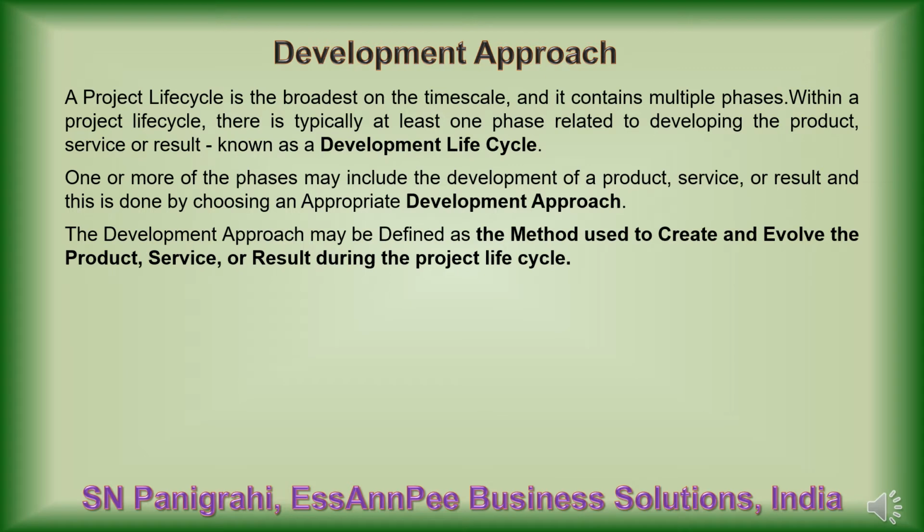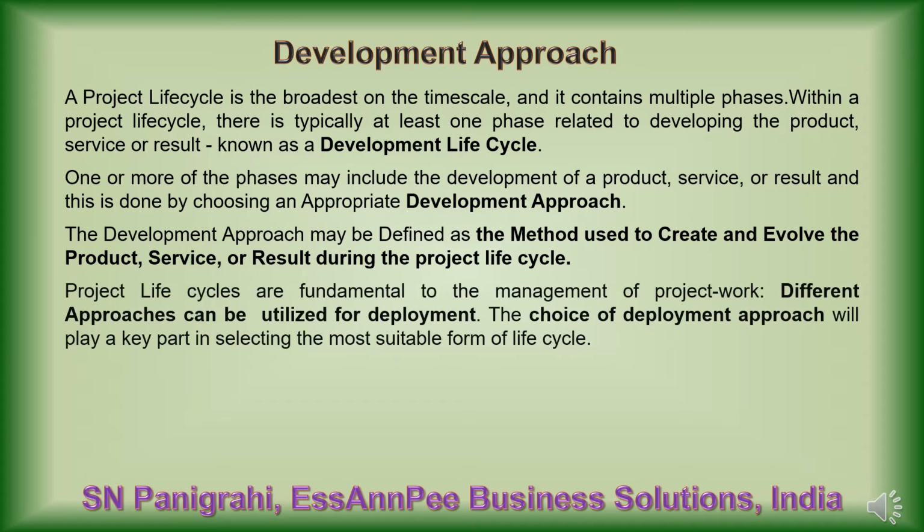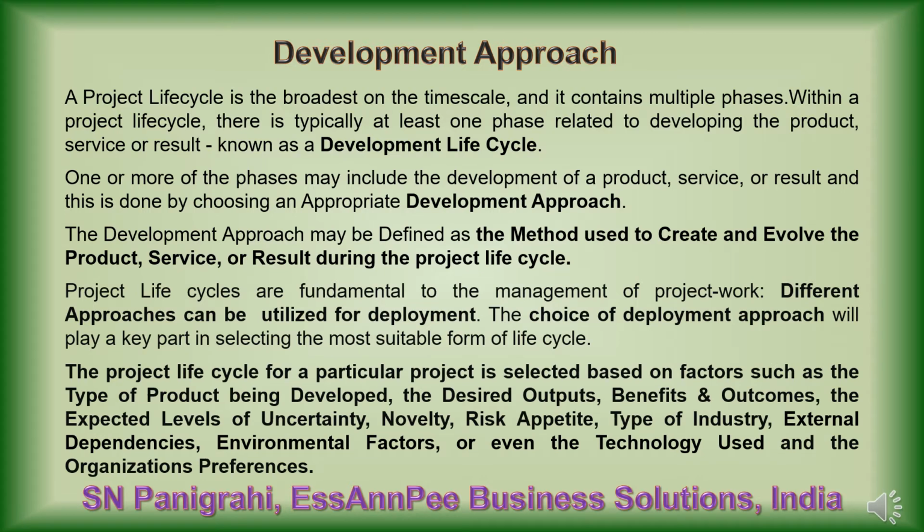The development approach may be defined as the method used to create and evolve the product, service, or result during the project life cycle. Project life cycles are fundamental to the management of project work. Different approaches can be utilized for deployment. The choice of development approach will play a key part in selecting the most suitable form of life cycle. The project life cycle for a particular project is selected based on factors such as the type of product being developed, the desired outputs, benefits and outcomes, the expected levels of uncertainty, novelty, risk appetite, type of industry, external dependencies, environmental factors, or even the technology used and the organization's preferences.